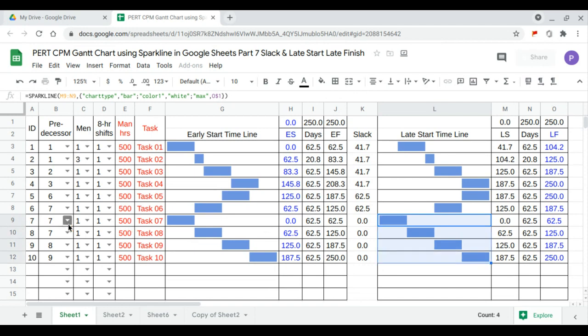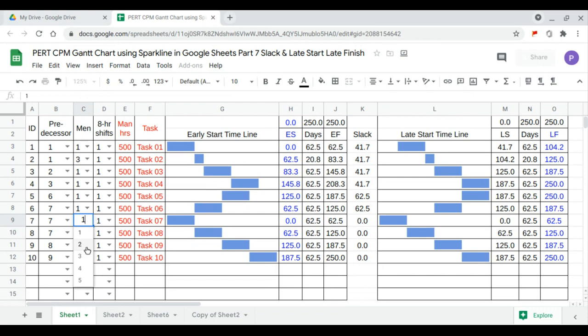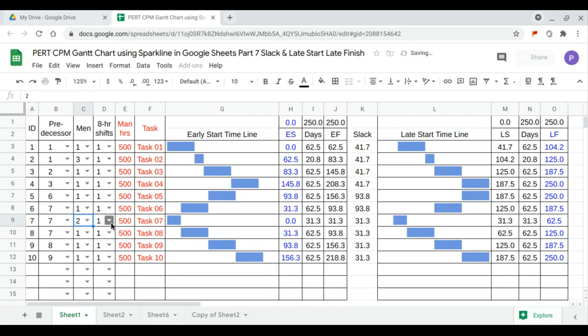I want to improve task 7. I will add 2 men and 2 shifts.